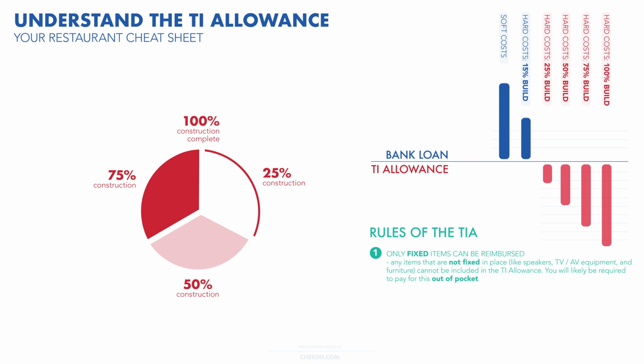It's crucial to anticipate out-of-pocket expenses early in the process, as these are typically incurred by the tenant. Additionally, bear in mind that the landlord will institute a 30-day review period for each Tenant Improvement Allowance (TIA) request. When requesting these funds, be prepared for a meticulous examination of documentation. Proof of materials purchase, contractor payments, and subcontractor settlements will all be scrutinized.